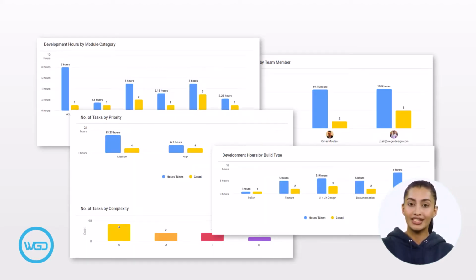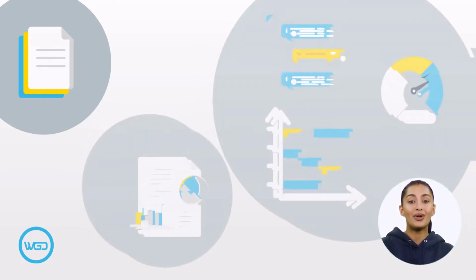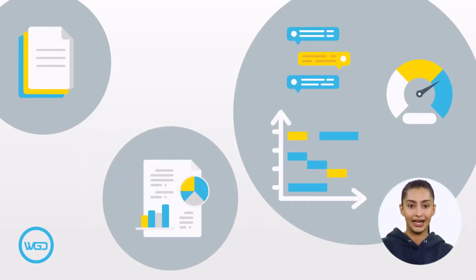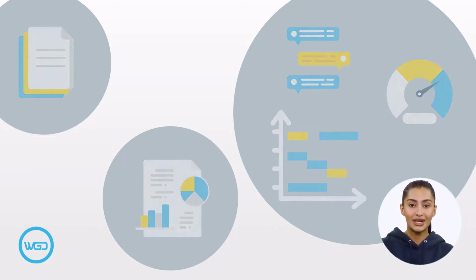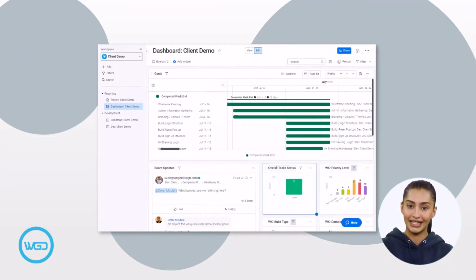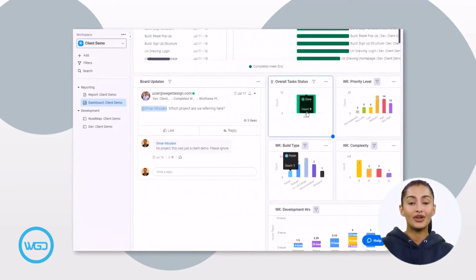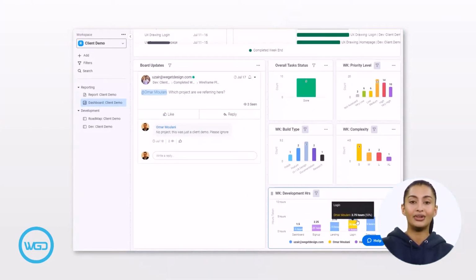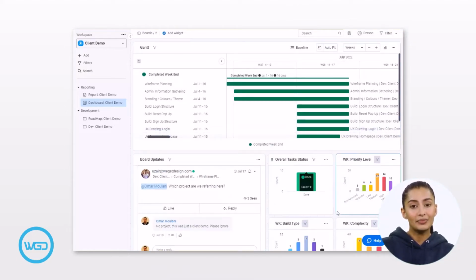Our aim initially was on a weekly basis, but we found that it actually interfered too much with our current project management methods. So to help resolve this, we split the report into a monthly update and a real-time dashboard. The report will summarize that month's work, but with more detail. The dashboard will give you a real-time snapshot of your project, with development hours, high-level task overview, interactive Gantt chart, and a centralized place for development updates.